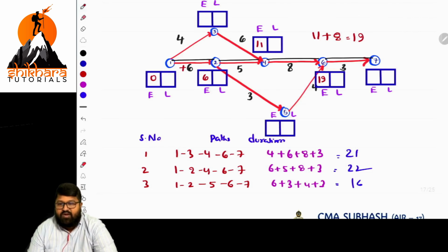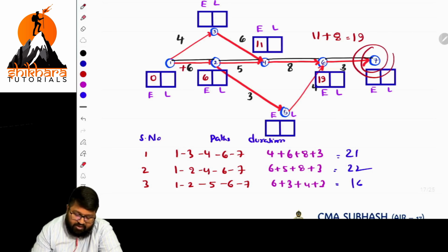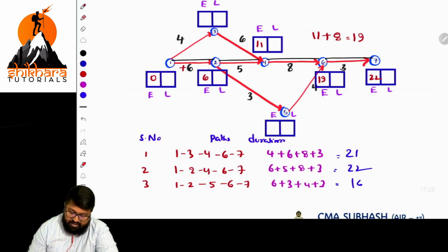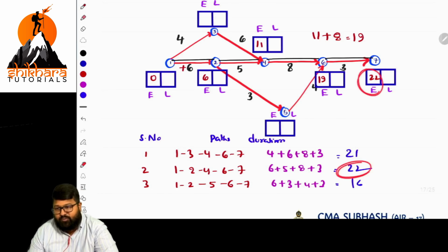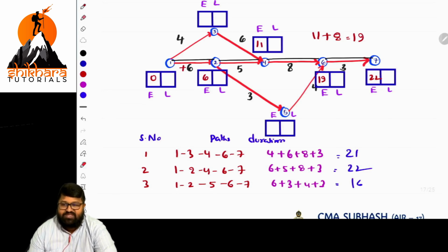And the last one. Just for this point, are there alternative paths? No, one path. That is 22. One more basic point and basic logic, sir: here the highest path value is 22, and the E value will also be the same, 22, because we are adding along the same path. When you are in the exam, these things may help you the best, so be careful with this area.